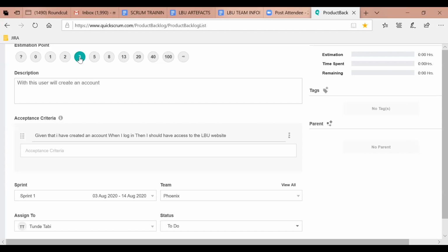Focus group is fine. So let us assume we are trying to size that piece of work called focus group. I then say, Mr. T, how much effort goes into this? This now takes us back to the basket of oranges. If you remember, I said if we say to fill up a basket of oranges is 1 point, then if I say you should fill up 2 baskets of oranges, it will be 2 points. Do you remember? Yes, I do. If I then give you 3 baskets, it is 3 points.